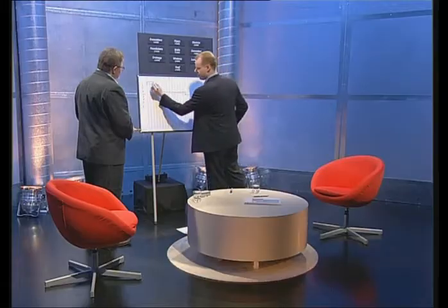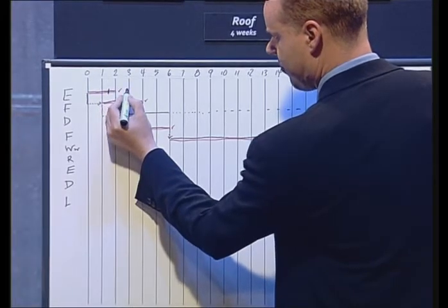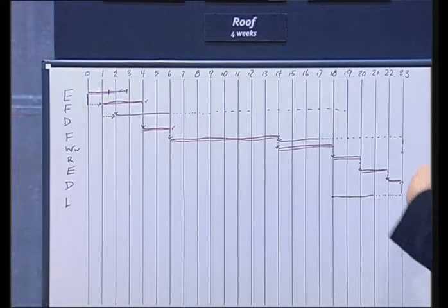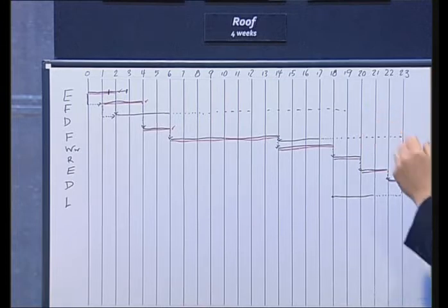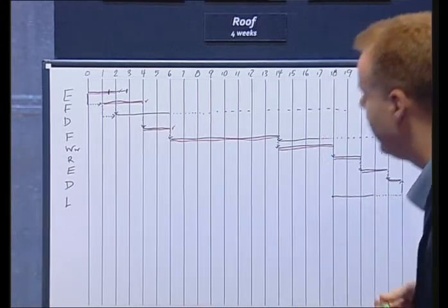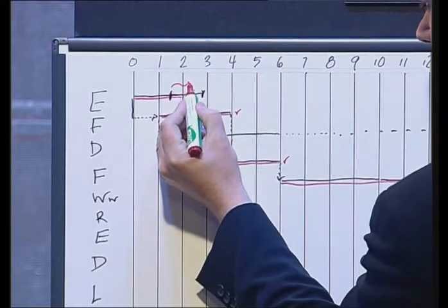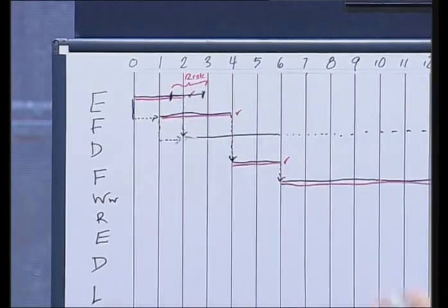Yeah, exactly. When you first start a plan, obviously with a house, it's much easier. Houses have been built before, they're largely built the same way. So our guesstimates ought to be reasonably good estimates. In more unique projects where there's a lot more uncertainty, the best thing to do is to try and build in some risk factors on your activities. So you might start showing some pessimistic, most likely, and optimistic examples of how long those activities take. The benefit of doing that is that you are clearly demonstrating your level of risk on each of your activities